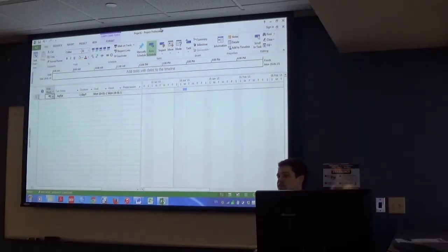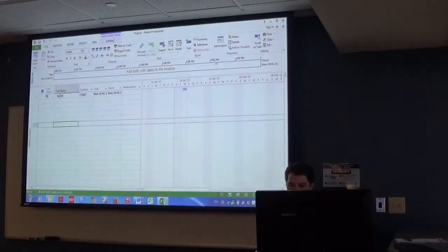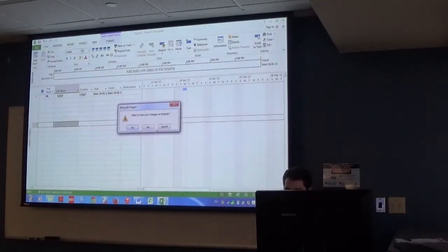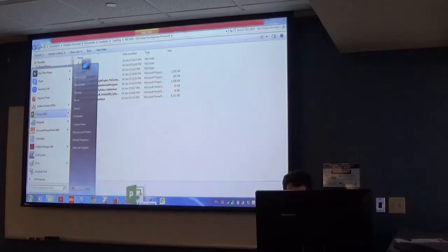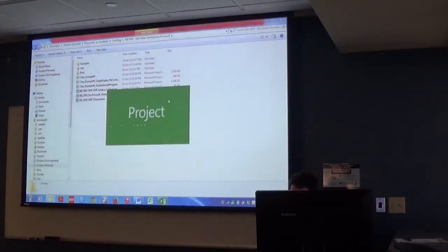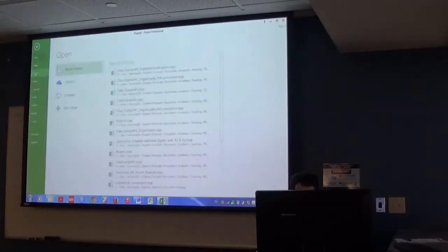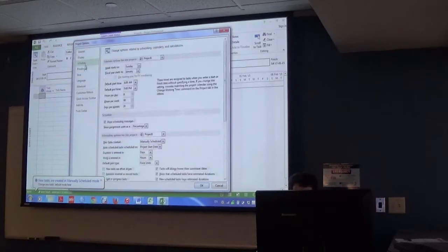All right, okay guys, there's a bunch of stuff we're gonna have to cover here today, so let's get at it. So File, Options. Like I said before, if you have this weird pen, sometimes it'll have a question mark. Gotta change that to auto schedule. If there's a question mark there, I highly advise just closing the program, opening a brand new one, and selecting auto schedule right away. I'm just gonna pin Project Pro in my taskbar here. So I'll start a new one, blank project, Options, Schedule, Auto Schedule.